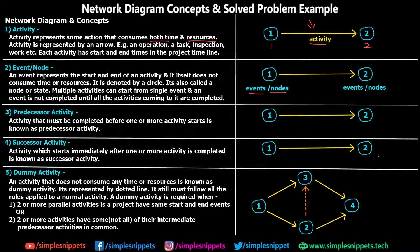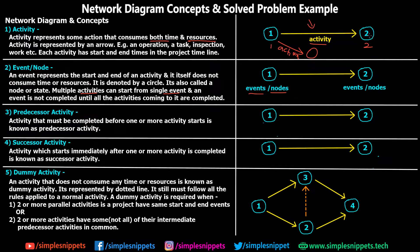Multiple activities can start from a single event. An event is not completed until all activities coming into it are completed. So a particular event will not be reached unless every activity leading into it has been completed.